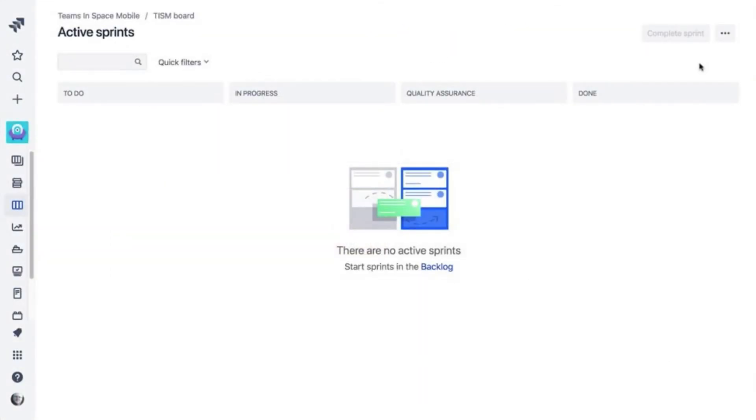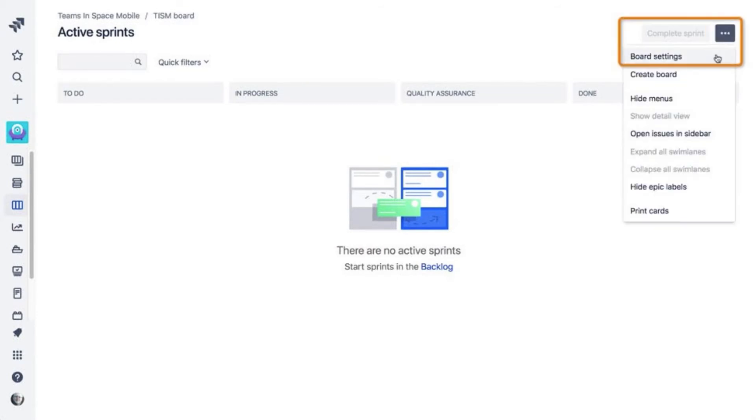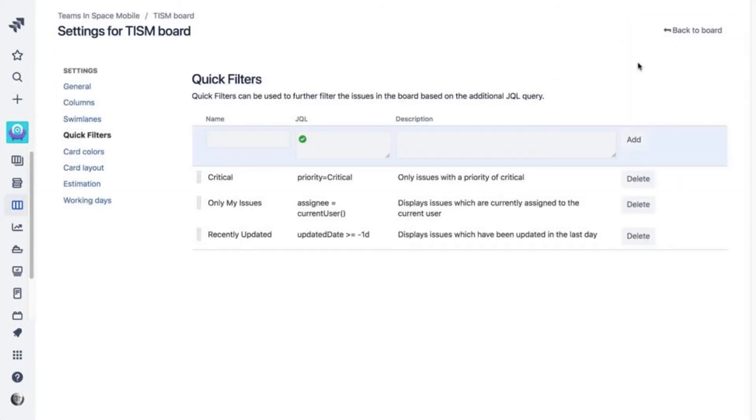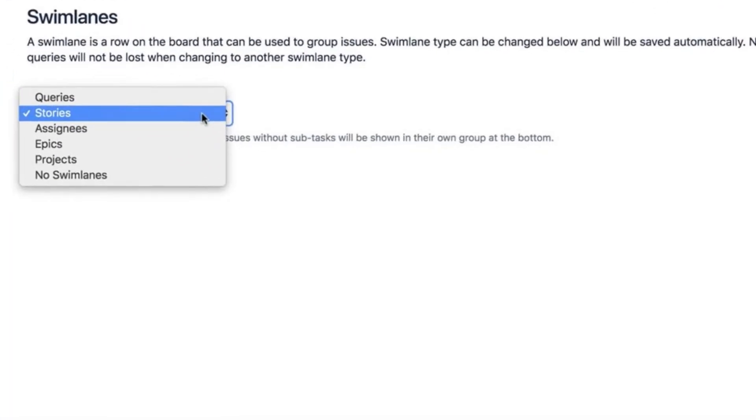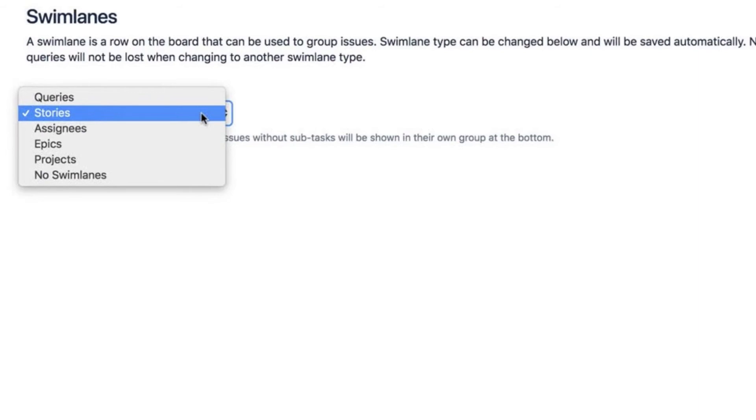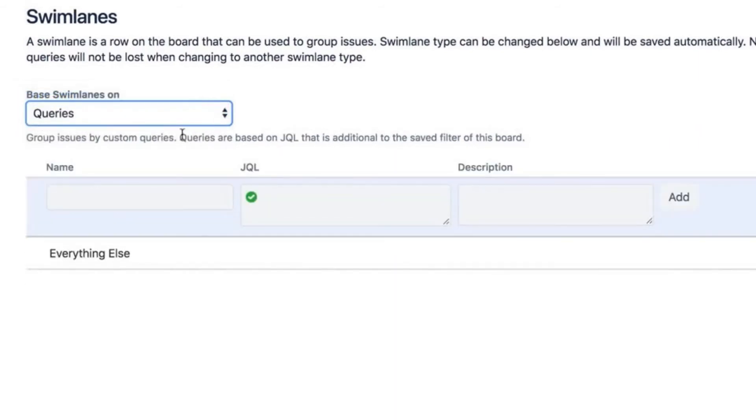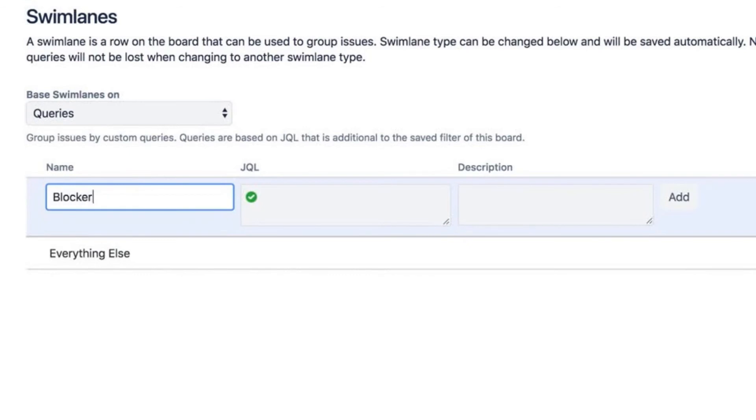To create a swim lane, go to your board, click More, then select board settings. Select the swim lanes link. Next, choose the criteria to define your swim lane. You can create swim lanes grouped together by queries, stories, assignees, epics, or projects.